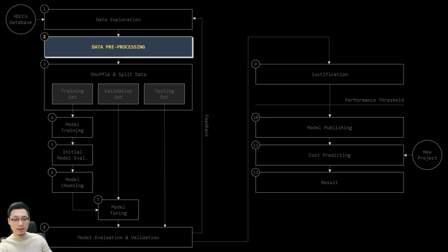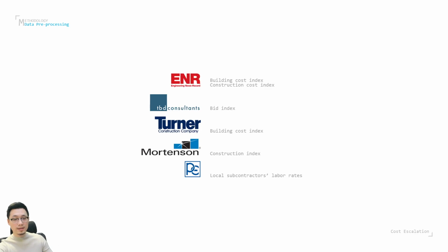Data preprocessing is a fundamental step to assure the model reliability through cleaning, formatting, infilling, and scaling the raw data. 5 preprocessing steps will be performed sequentially to help with the prediction outcome based on the understanding of data characteristics in the previous section. The first step is escalation. The process is to convert project amounts entered in various years to today's dollar.